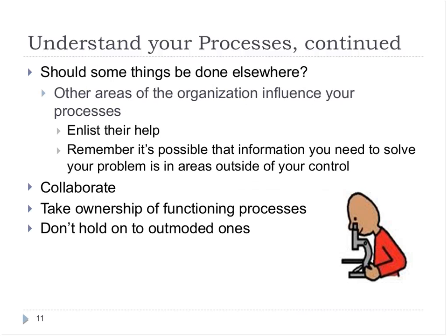Sometimes as you're implementing, as you're learning things, as you're testing, as you're training, you see some other things that would really be beneficial to your process. Oh, wow, I can do this. Let's do this. You really need to stifle the impulse to add it to the original project. You want to do the basics first, and then look at adding some of that stuff that you've discovered along the way in the next implementation, the .2 version or the .3 version.